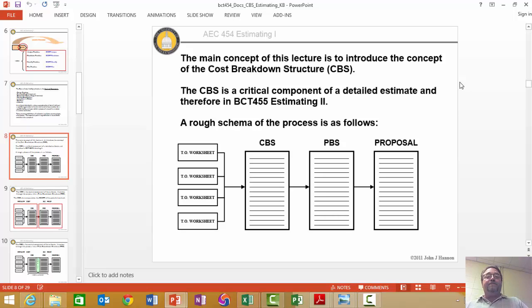But I've got a little diagram here that shows the cost breakdown structure with these little lines that are blank. And all of that could be on the same table. The cost breakdown structure lines could be the same for the price breakdown structure lines, those items. It's just over here, they're cost items. When you mark them up, they're prices. They're price items. They're pay items. Cost items, pay items. Okay? And then if you get the work, it's schedule value items.